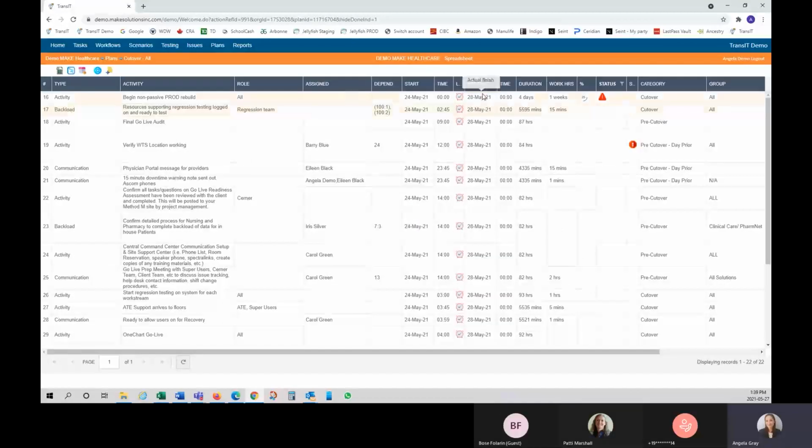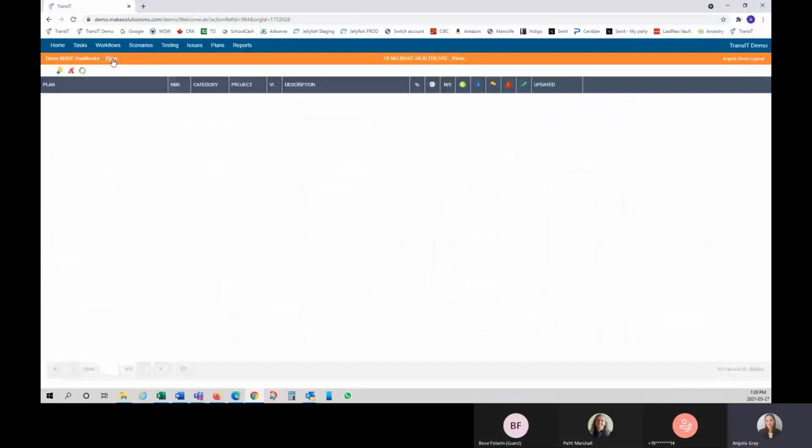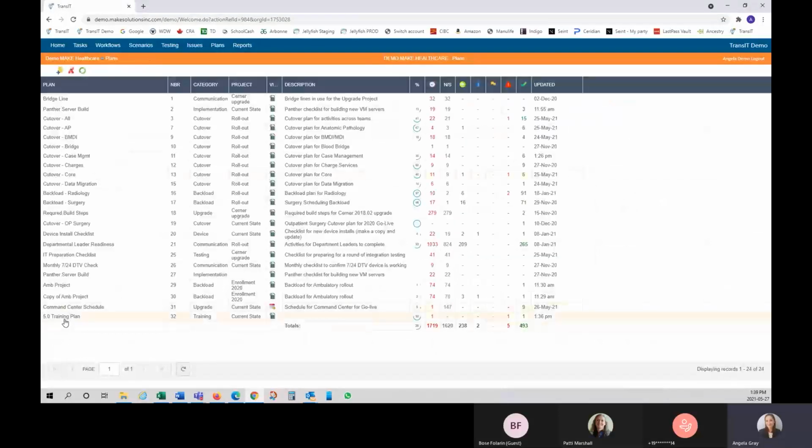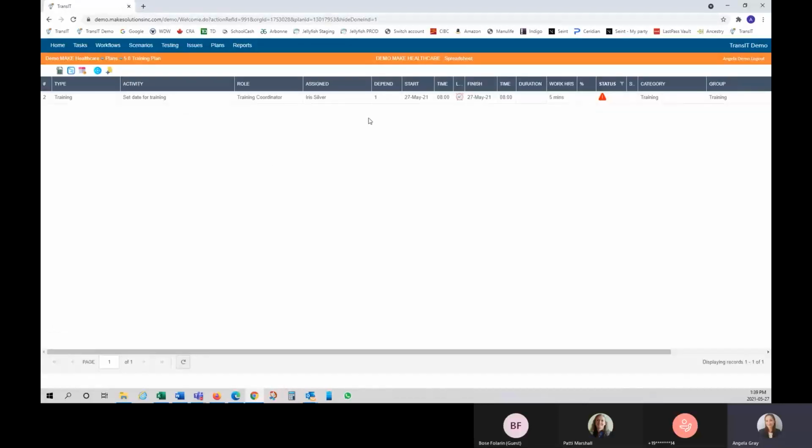And we'll say plan number 3 with activity number 17. So in order to create that dependency, I could double click here and I could say plan number 3, line number 17. And that's all it is to it.